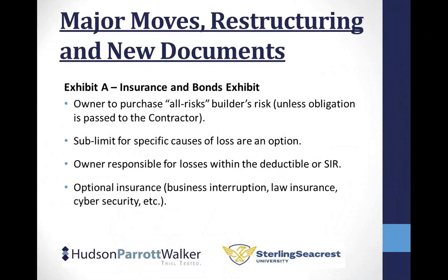Fire, windstorm, potentially flood, that's an option. Earthquake, that's an option. There's all kinds of options. But fire, windstorm, vandalism, theft, the main ones, that's what you get if you're just talking about an all-risk policy.